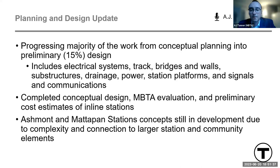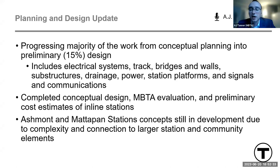The majority of the program is progressing from the concept stage to the 15% design stage. This includes electrical systems, tracks, bridges, substructures, drainage, power, inline station platforms, signals, and communications. Today we will share conceptual designs and renderings for the inline stations along with preliminary cost estimates. The team is still working on Ashmont and Mattapan station designs — there are many complexities, tradeoffs, and challenges at both locations. These are the most critical stations to the line. I'd like to introduce Phil Santos, project manager for HNTB, the primary design consultant, who will walk us through the program update for each station.